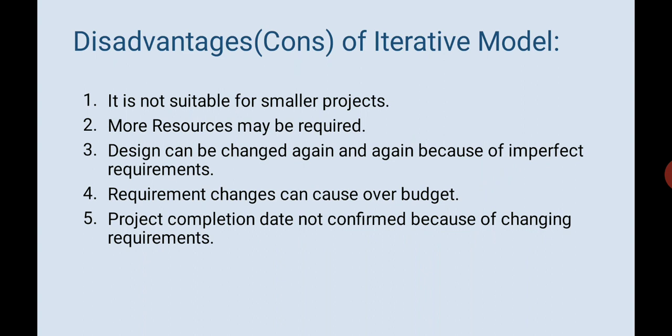The ambiguous requirement could not make you aware beforehand of how much time will be needed, right? Because the requirements were vague, they were ambiguous. You started with a few requirements. Remember, in the first slide we saw the few specifications, few requirements, whereas in the waterfall model a very precise time could be guessed as to how much it will be required for the completion of the project.